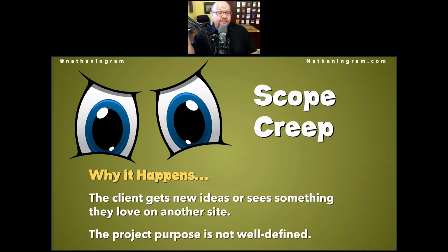It happens because the client, maybe they get new ideas, or they see something they love, or they have a friend that's in the same business and, oh, they did this on their website and it's working well. We should do this on our website. So the client gets new ideas, or they see something they love. That's one of the reasons it happens. The other reason is the purpose of the project is not well defined. And so the client gets shiny object syndrome of, oh, let's do this, when it doesn't really go back and support the reason why we're building this site to begin with.